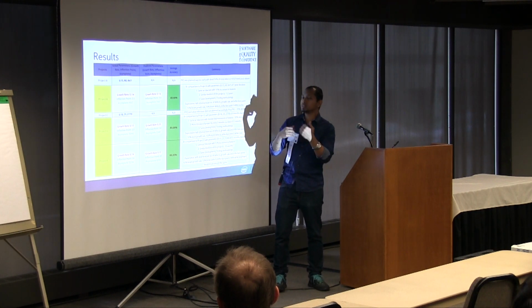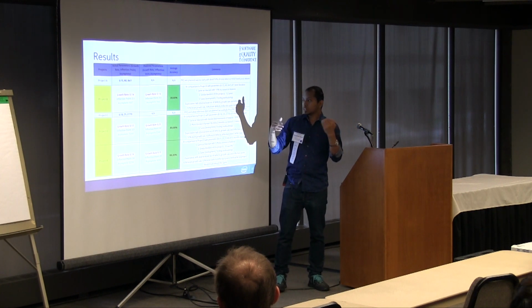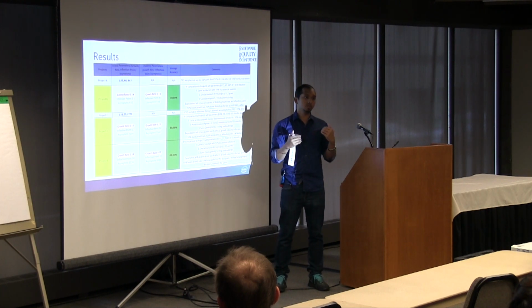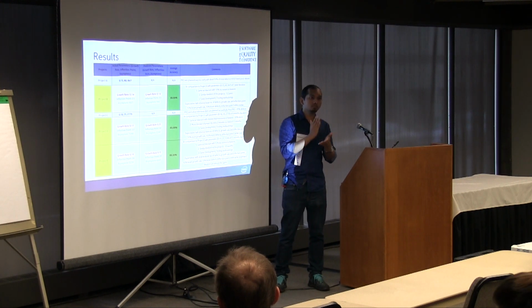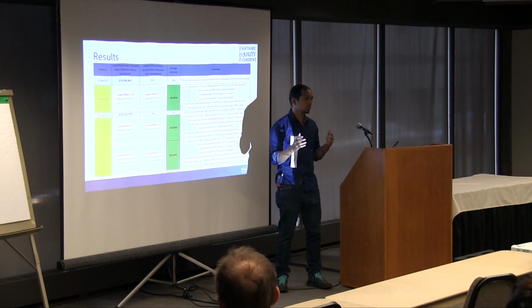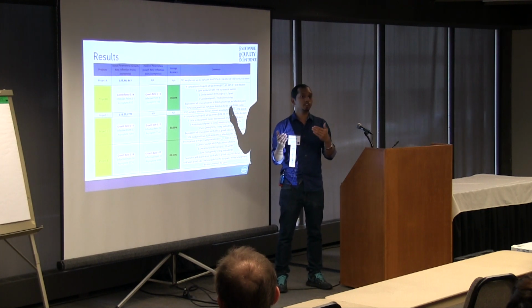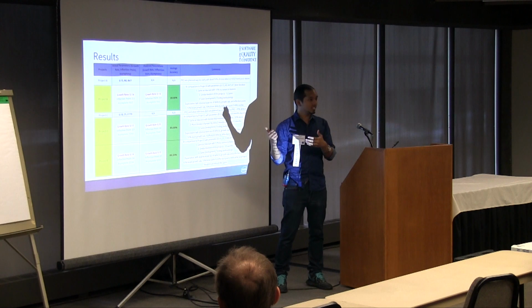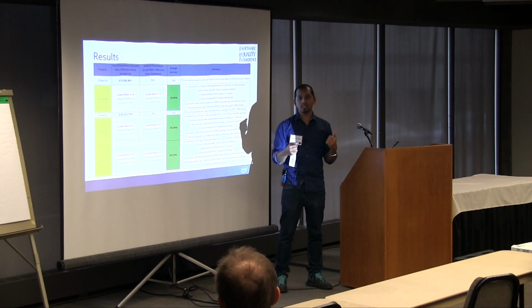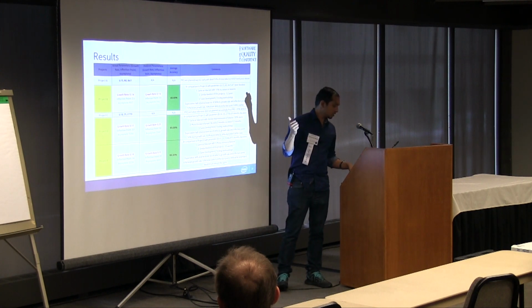That's why we estimated roughly 10% lesser growth rate and 30% lesser defects, and since the project ended much earlier, the way inflection point works is that if the project is smaller, your inflection point will be much earlier, which is at 50% of the work weeks. This is based on observation, on what we observed after applying this model to a lot of projects. This may not work for you as it is, but you can always apply this to your own projects and come up with these predictions.